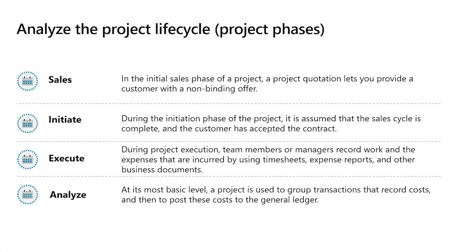It is important, and I want to point this out, that the quote may change from the final invoice, because there may be changes to the scope of the project or any type of surcharges. But until your customer accepts that contract, nothing's binding up to this point. Only when that customer accepts that contract or that quote do you move on to the initiation phase.